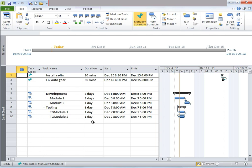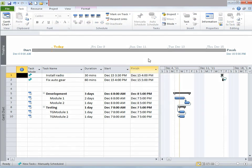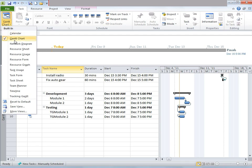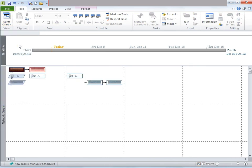Gantt Chart with Timeline is another kind of view, which we currently have opened. It is identical to the Gantt Chart view with the addition of the new Timeline view above the Gantt Chart. Now let's look at Network Diagram. I'm going to go ahead and click on Network Diagram. It is used to access the relationships and flow of work in the project, with the critical path highlighted in red. Non-critical tasks are shaded in blue, and manually scheduled tasks are textured.